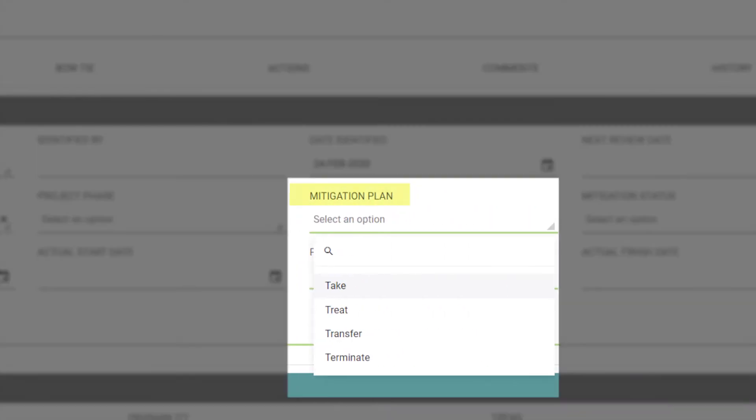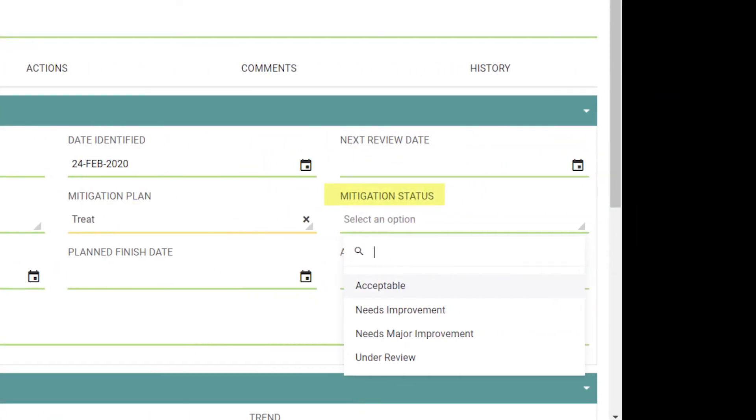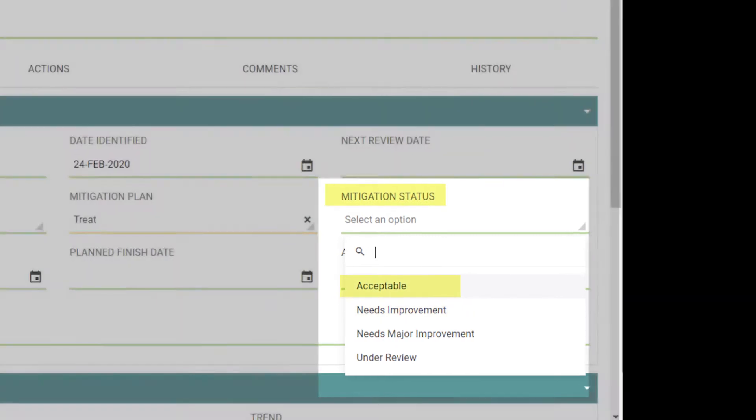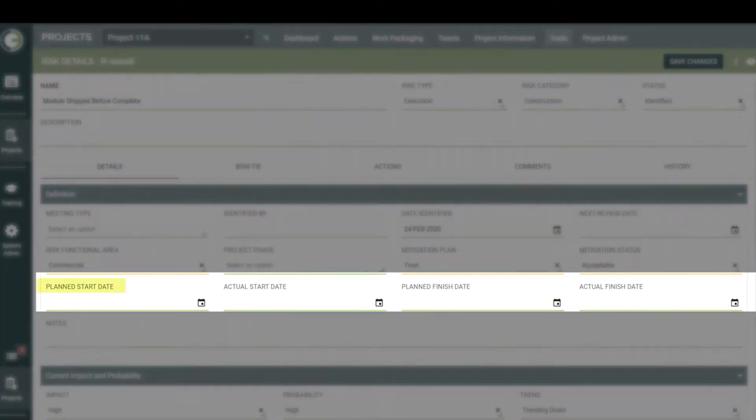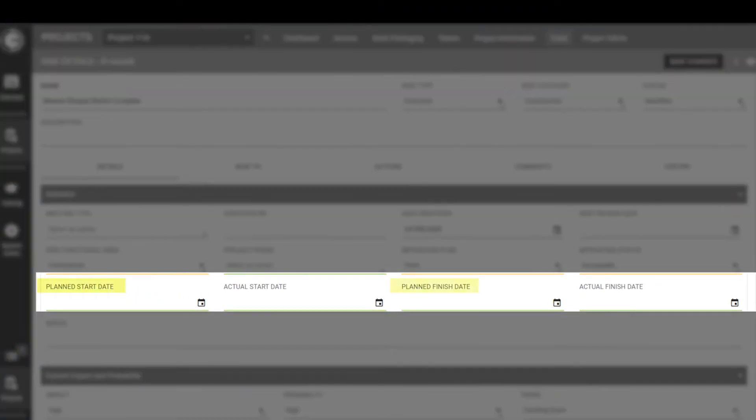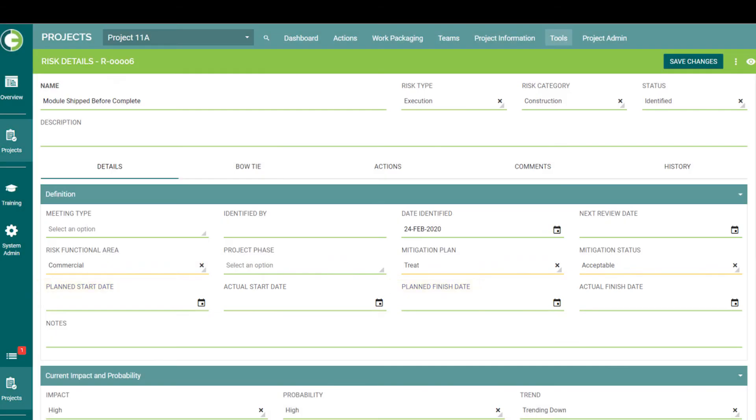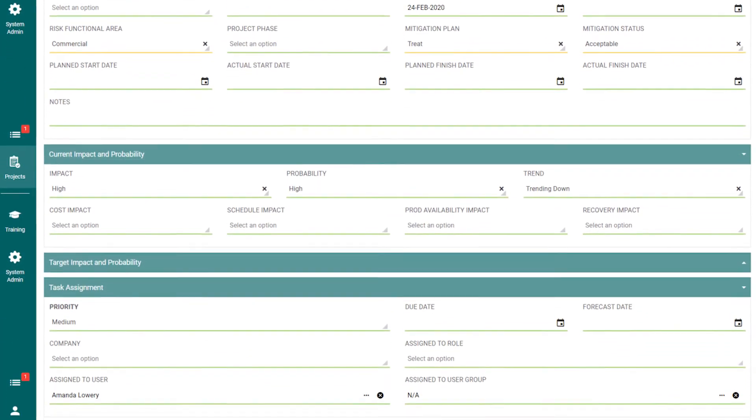The mitigation plan section displays what you plan to do to mitigate this risk, such as treat the potential problem. Mitigation status displays how the determined plan is currently viewed. Does it need more planning, or is it acceptable as is? And finally, the planned start and planned finish dates display when you plan to enact this mitigation plan. Of course, you can always come in and put in the actual dates later.